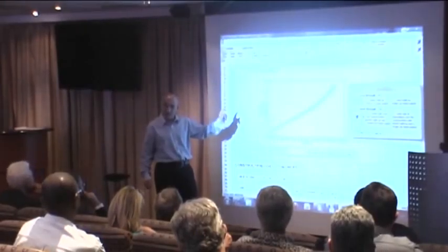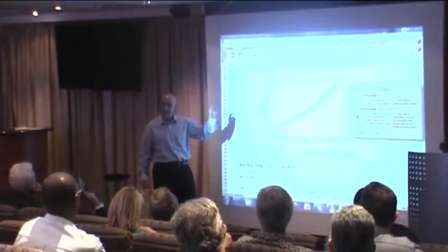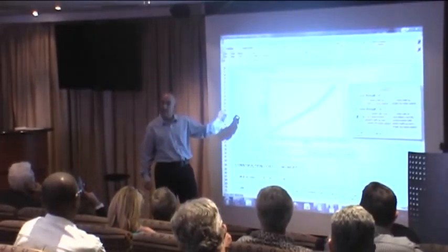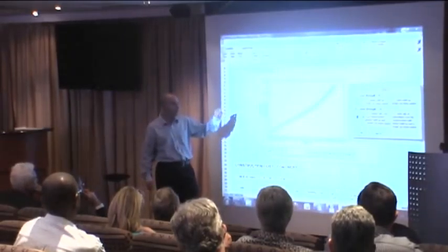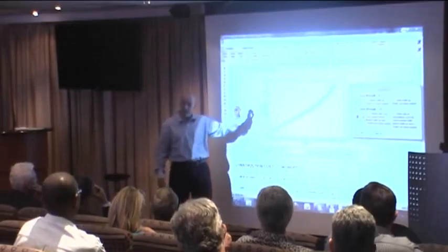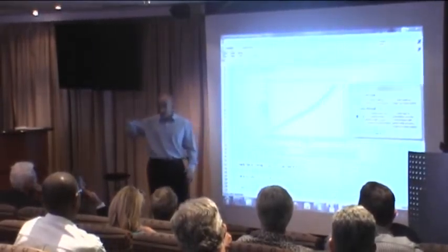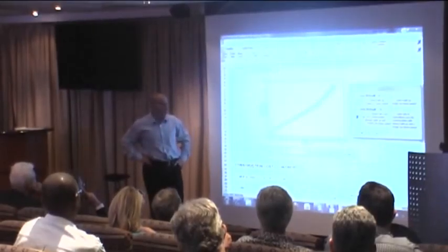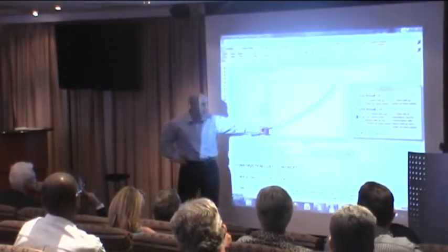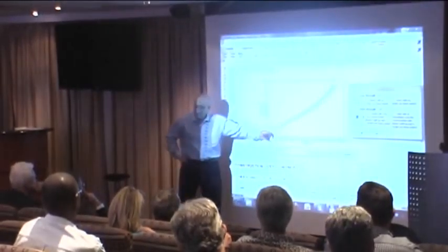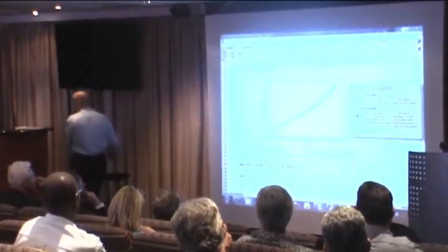So it's going to tell you, you are running 6 calendar days late at this point. In order for you to catch up, you need to be doing a certified value of work of X amount in the following month. So that's what you need to be performing if you want to be on schedule to meet your completion date. And that's just one of the features which I'm not going to go into. I'm just going to go back into the default.